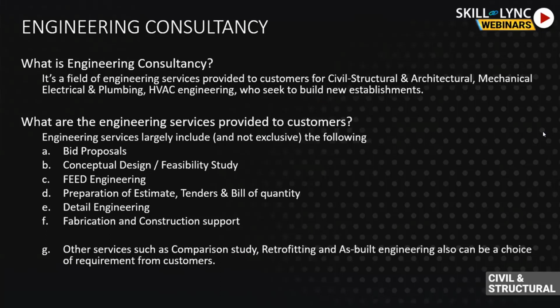IFC standard means that's the final product that an engineering consultant releases to the client, and which goes to the site or to the fabricator. Detail engineering involves 100% of final engineering from the conceptual design, from the FEED engineering, and after whatever bill of quantity has been set for each area of the establishment.